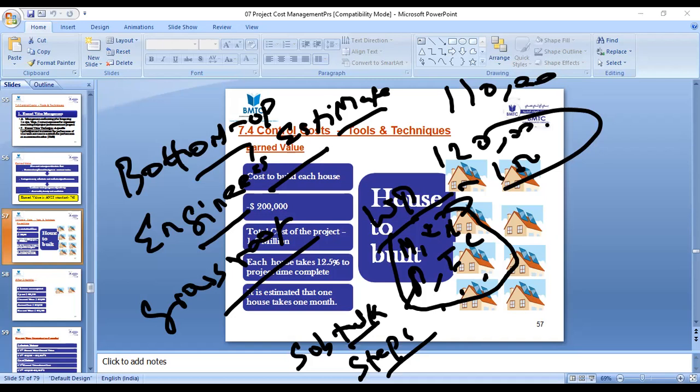So you're able to roll out from the last level to the next highest level, to the next highest level, to the next highest level. And once you reach the project level, you are able to bring pretty much accuracy in your estimation, whether it's the number of resources you need to complete the entire project, the line item cost you need to complete the entire project, or the duration units you need to complete the entire project. What is the total time scale? What is the total budget? And what is the total resource going to be spent for the project?